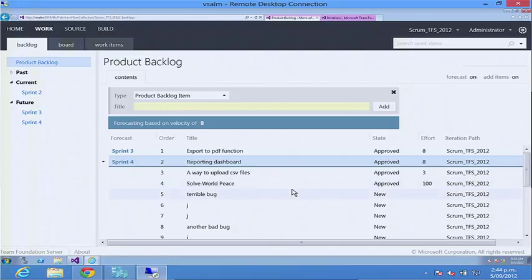And so it's going to give you a way also to have a conversation with your stakeholders who say, when am I going to get my feature? You can say, well, with the current ordered backlog and our current rate, it's going to be in sprint 5. That's 10 weeks away. That's when you're going to get it. So you can have a more numerical-based conversation about when you're likely to ship their feature, which can be useful from a release planning point of view.